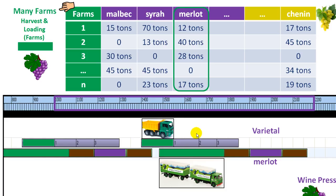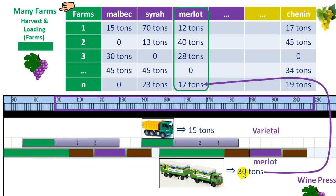Another constraint is that we want to use the full capacity of the truck. This small truck has a limit of 15 tons, and the big truck can load up to 30 tons. You don't want to waste the capacity — you don't want to load only 17 tons if the capacity is 30. So out of 40 tons available, you load 30 in one trip, and the remaining 10 tons will be loaded in another trip.